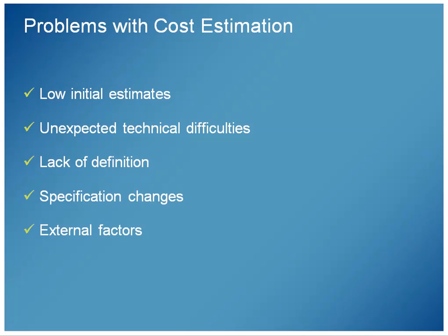So it's an issue and something to be mindful of, both as you are a project manager and as you consider and evaluate other projects. I would challenge, if I was looking to choose between 2 or 3 projects and talking to the project managers, I would say, now tell me where this budget might be a little low on the initial estimate, and what the costs might be in the worst case scenario. These are the best case scenarios. Tell me what the worst case scenarios were, and let them know that I want to make a really informed decision, not just blindly pick the lowest offer on the table.